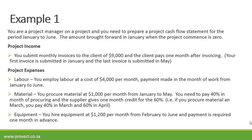For labor, you employ labor at a cost of $4,000 per month, and payment is made in the month of work from January to June. For material, you procure material at $1,000 per month from January to May, and you need to pay 40% in the month of procuring — the supplier gives one month credit for the remaining 60%. So if you procure material in March, you pay 40% in March and 60% in April. For equipment, you hire equipment at $1,200 per month from February to June, and payment is required one month in advance. Now let's do the example.